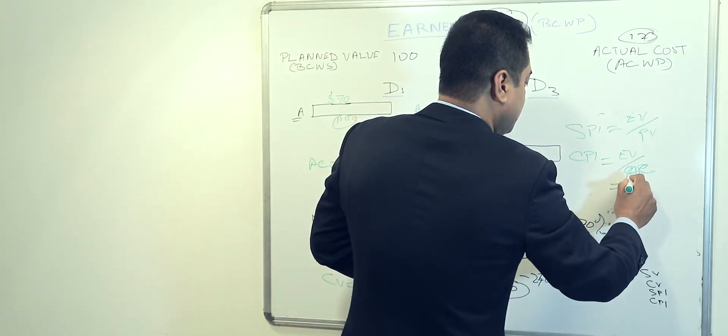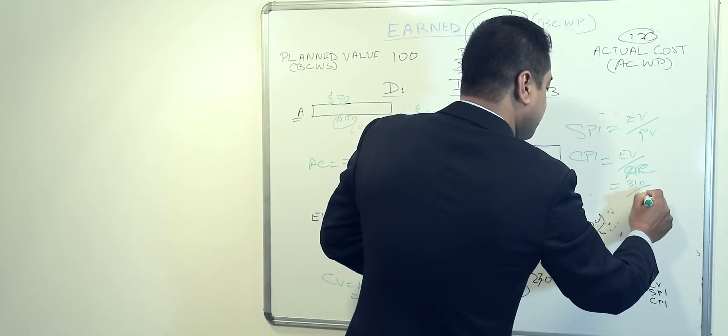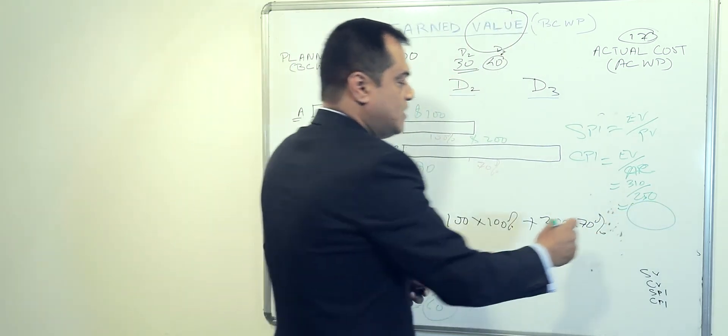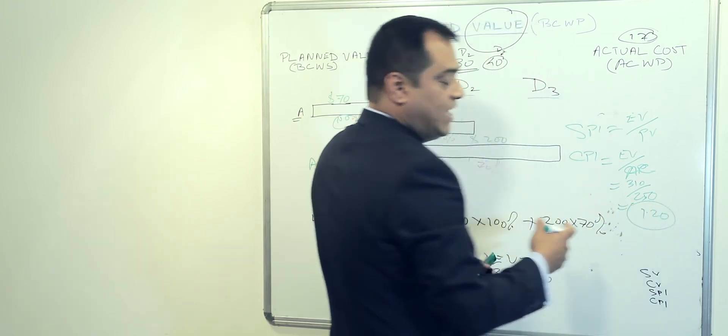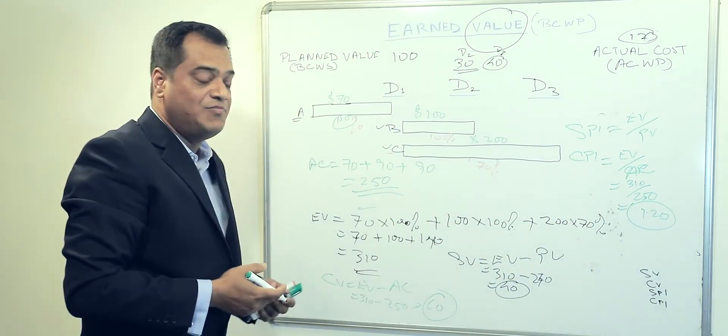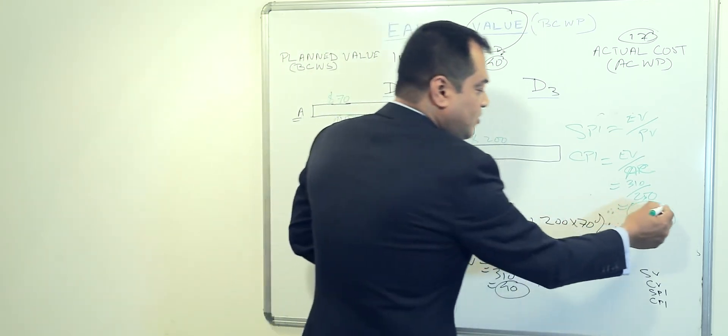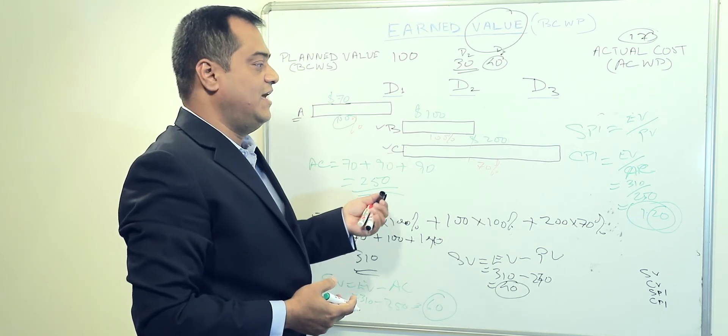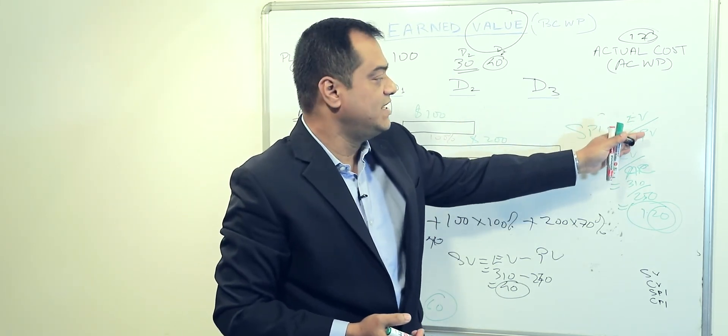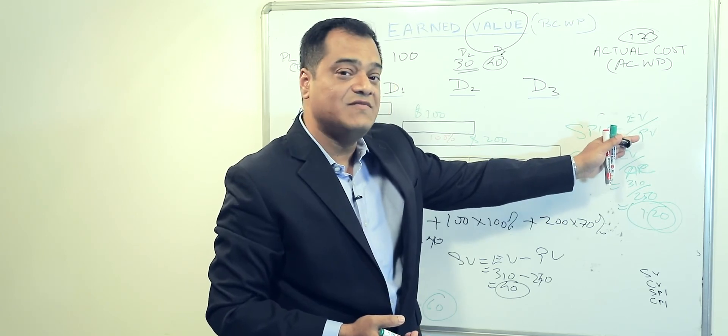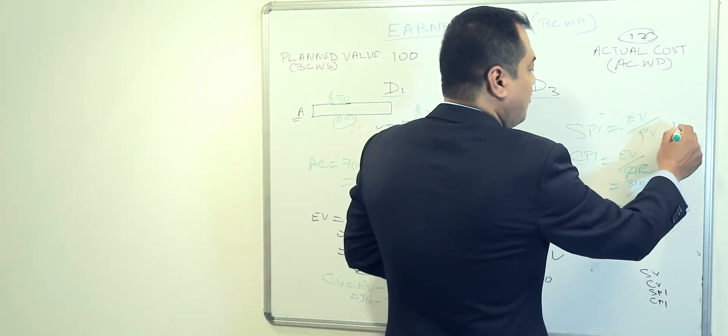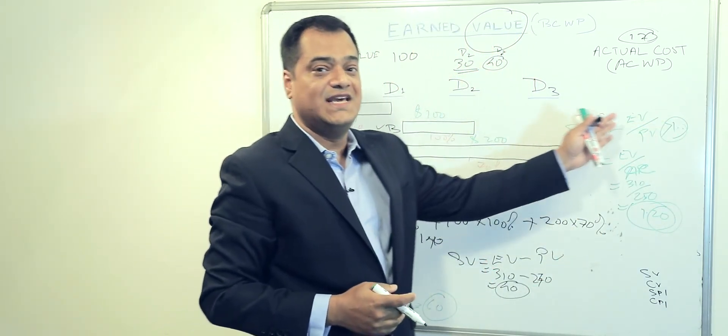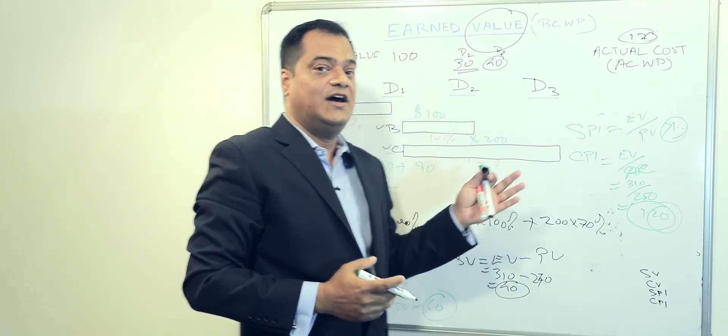So that makes it 310 divided by 250, whatever the percentage is, the efficiency. Let's presume this is 1.2. I have not calculated, just coming up with a number. That means we have performed 20% better than what is the actual cost. Likewise, if we see the percentage that comes between earned value and plan value, if that number is above 1, that means that much of percentage we have performed better in the project.